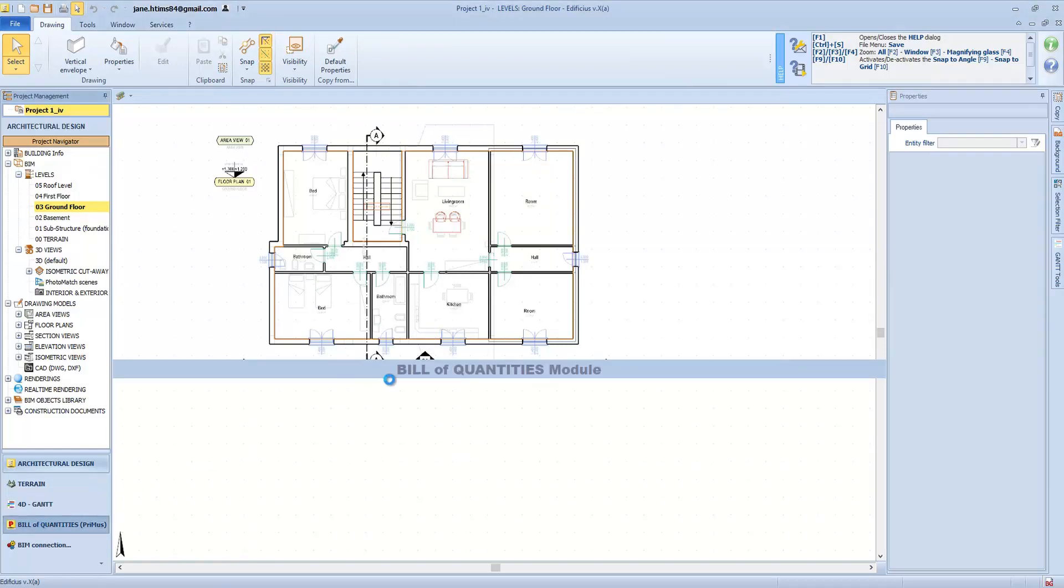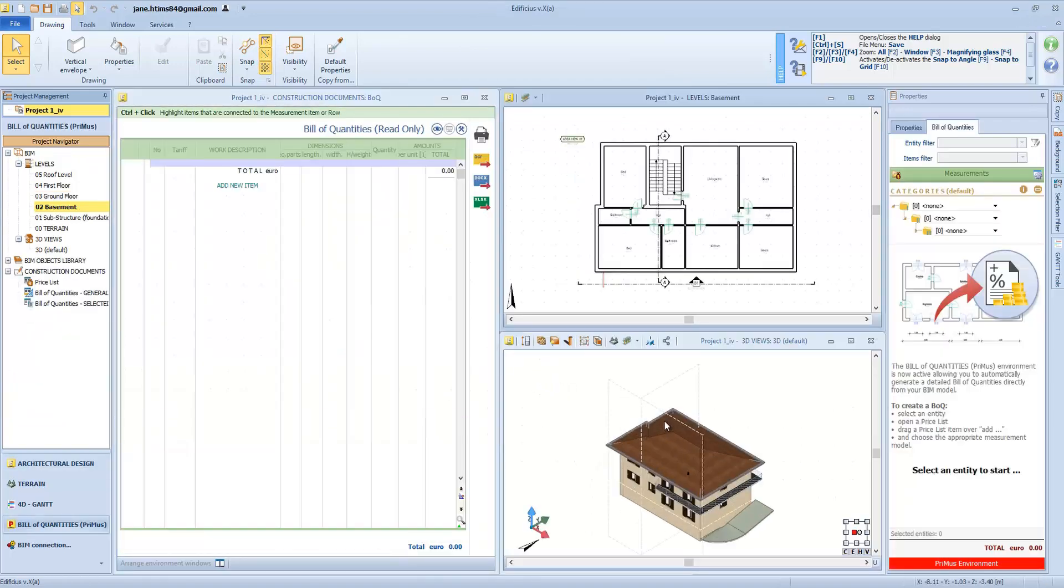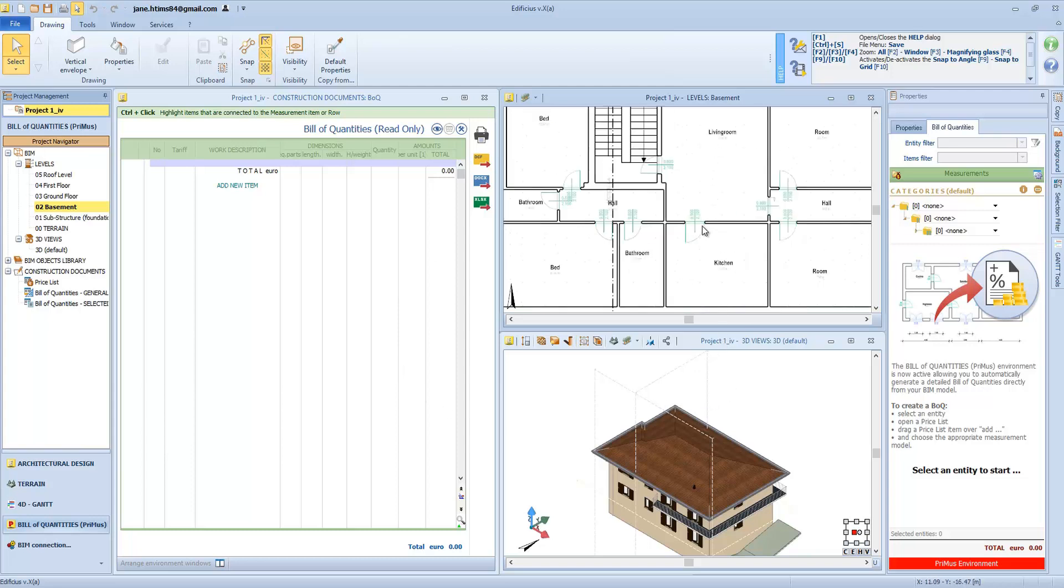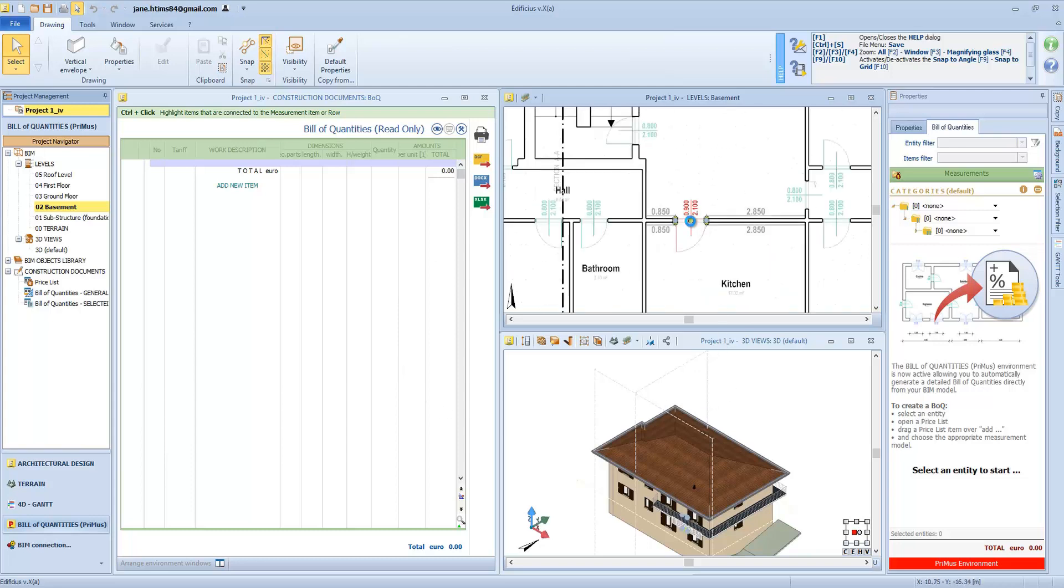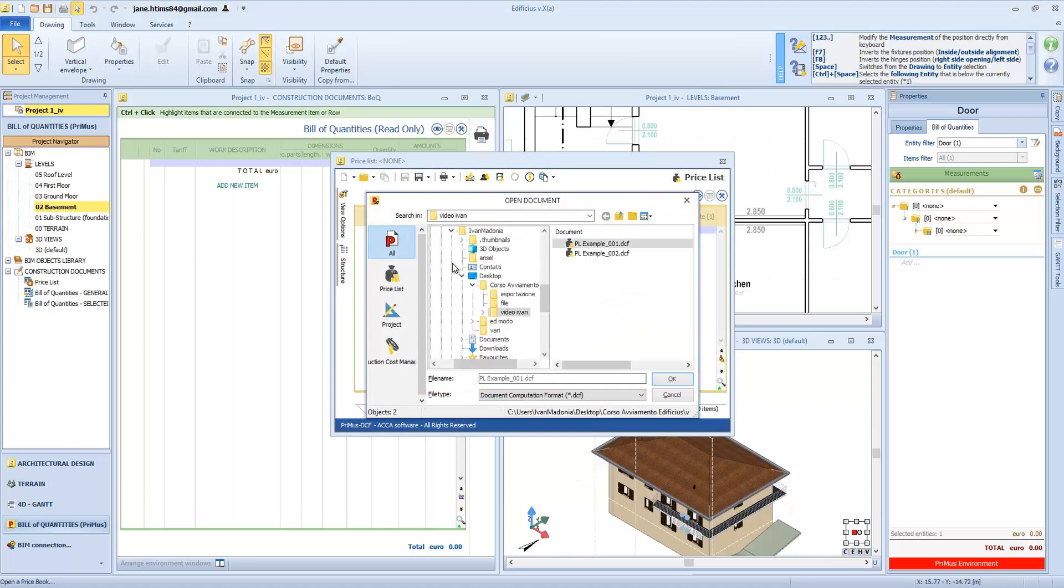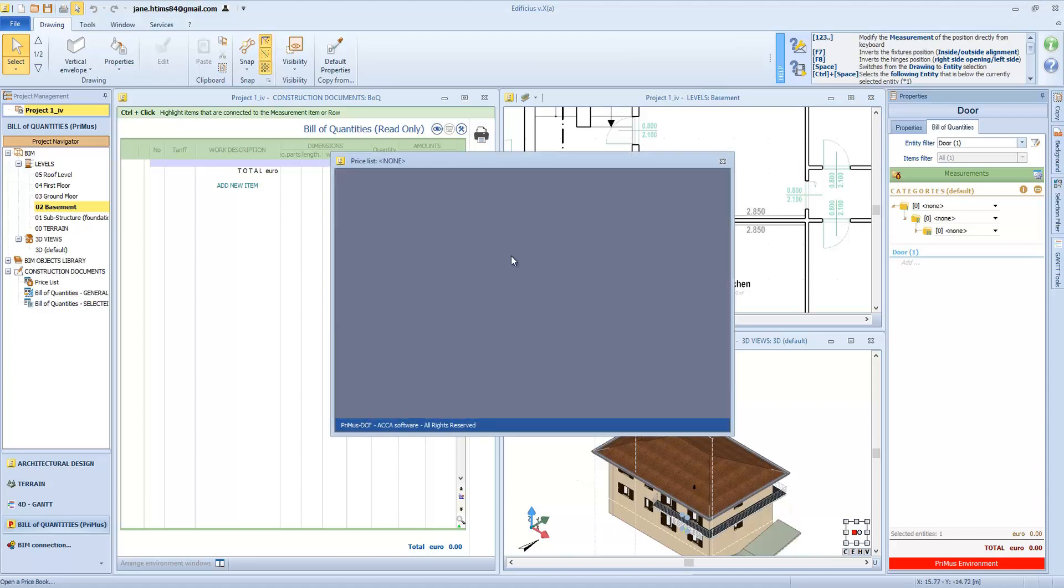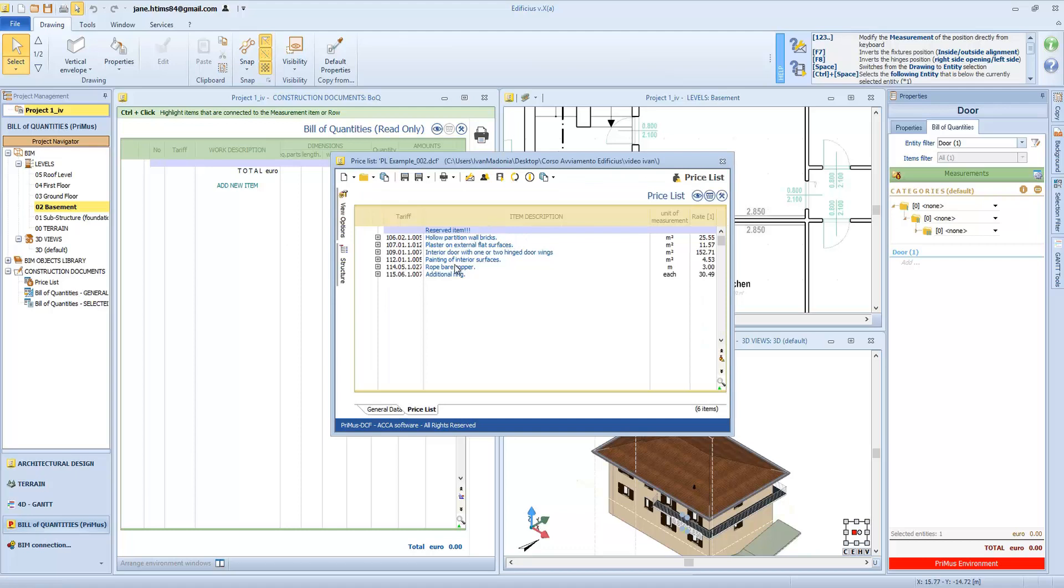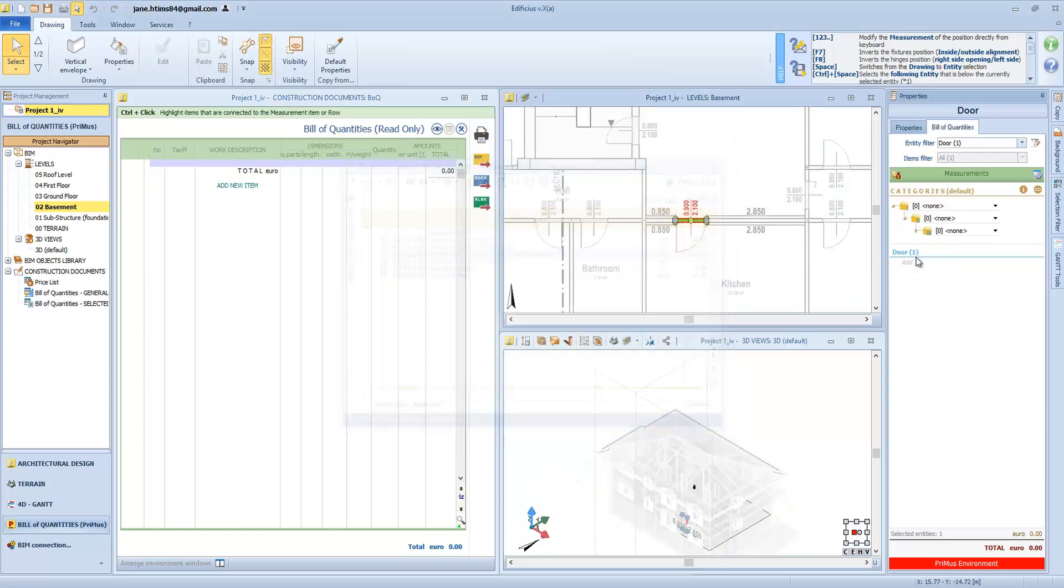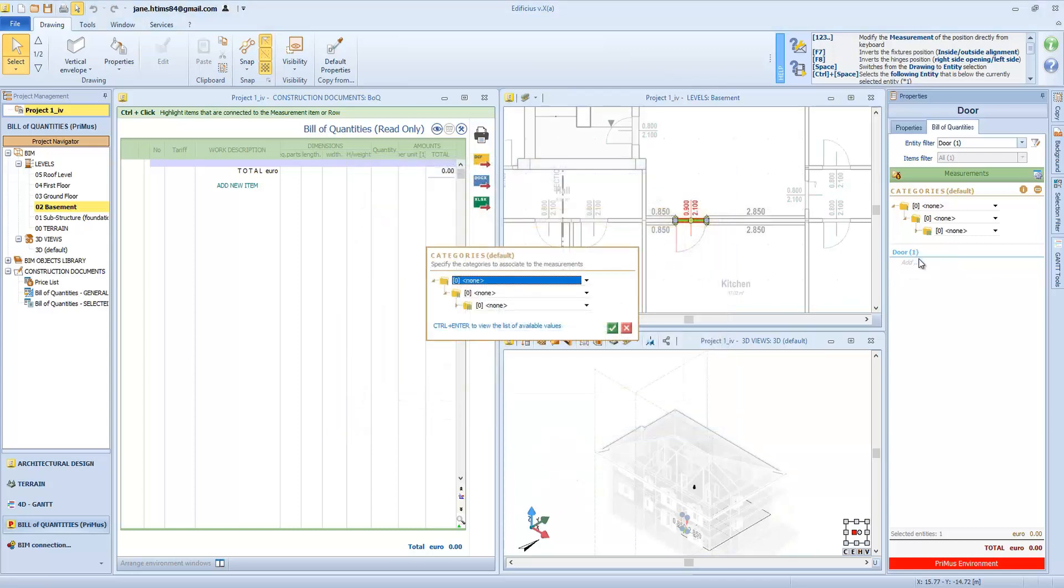Once opened, we have the bill of quantity editor windows, a level view, and a 3D view. To account for an object's cost, simply select it, click on the open price list button, select a reference price list, and open it. At this point, with the BIM entity selected, we simply find the relating cost element in the price list file, drag it over the add text, releasing the price list item, and the software will assign the unit rate to the BIM entity, and then ask us which category it belongs to for estimated document organization.